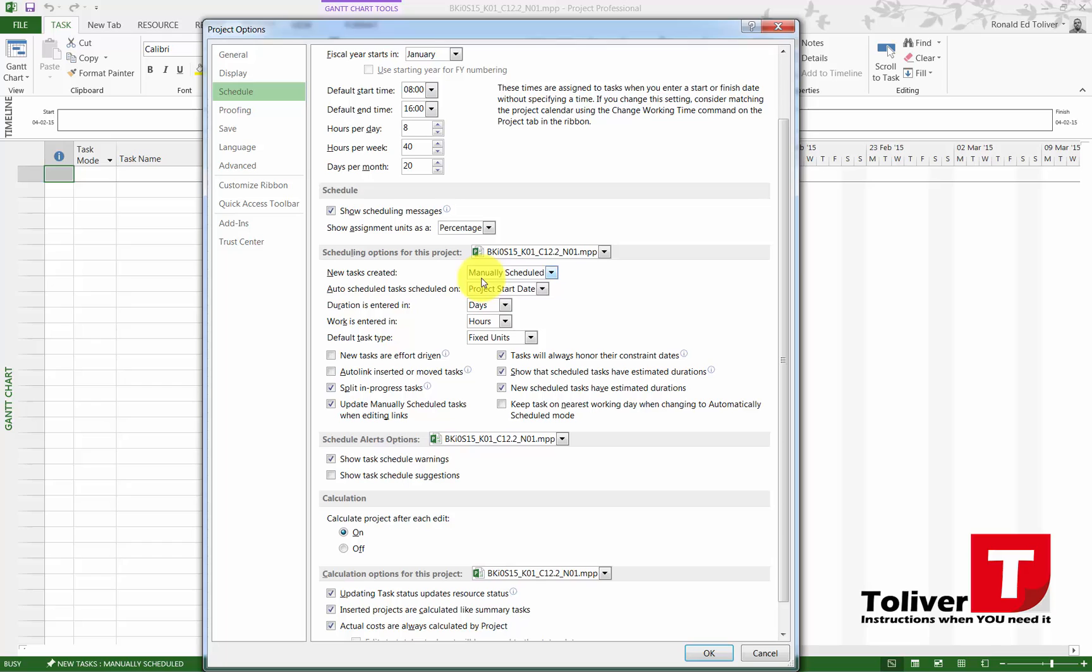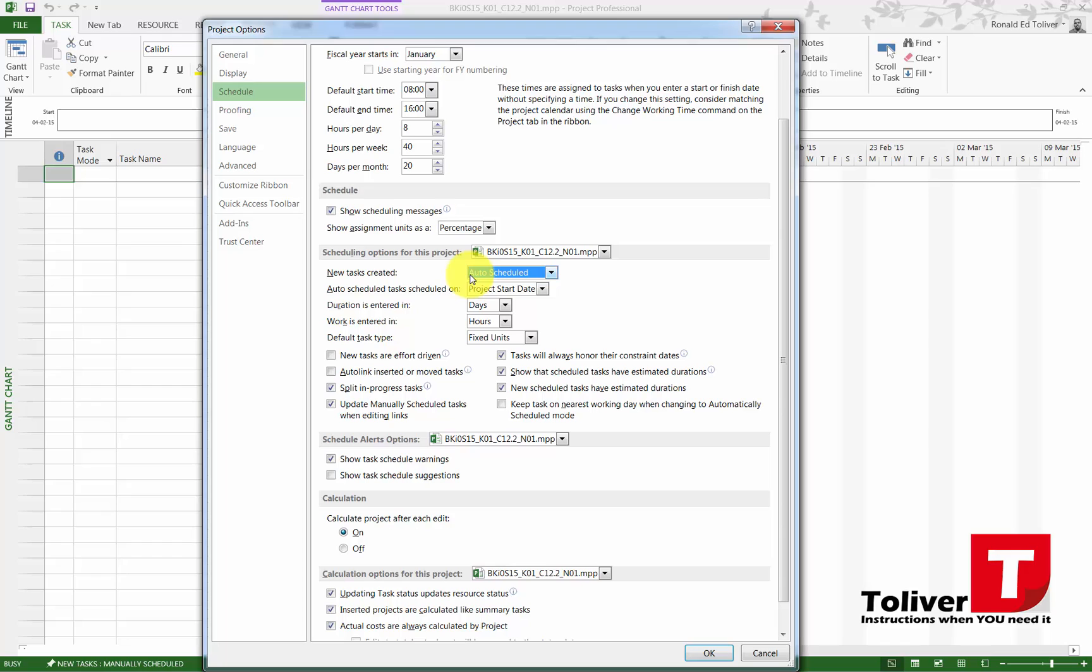Down here under Scheduling Options for This Project, I don't want new tasks created as manually scheduled. I want them actually placed when they're added. I want them as auto-scheduled. This option I just did right here—I could change it down here too. But again, auto-scheduled.